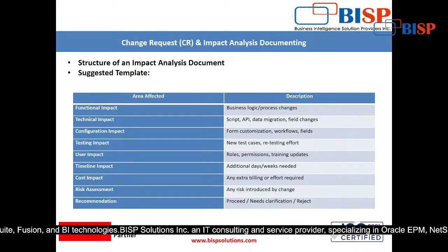Normally the standard practice is that you have prepared a change management document, then one more document will be prepared on what changes are required, then a third document, the impact analysis: what is the impact of your changes on each module. So there are n number of documents, so it is recommended that every person, whether a technical person or a functional person, should know how to write documentation, because this documentation is always required in every phase, right?